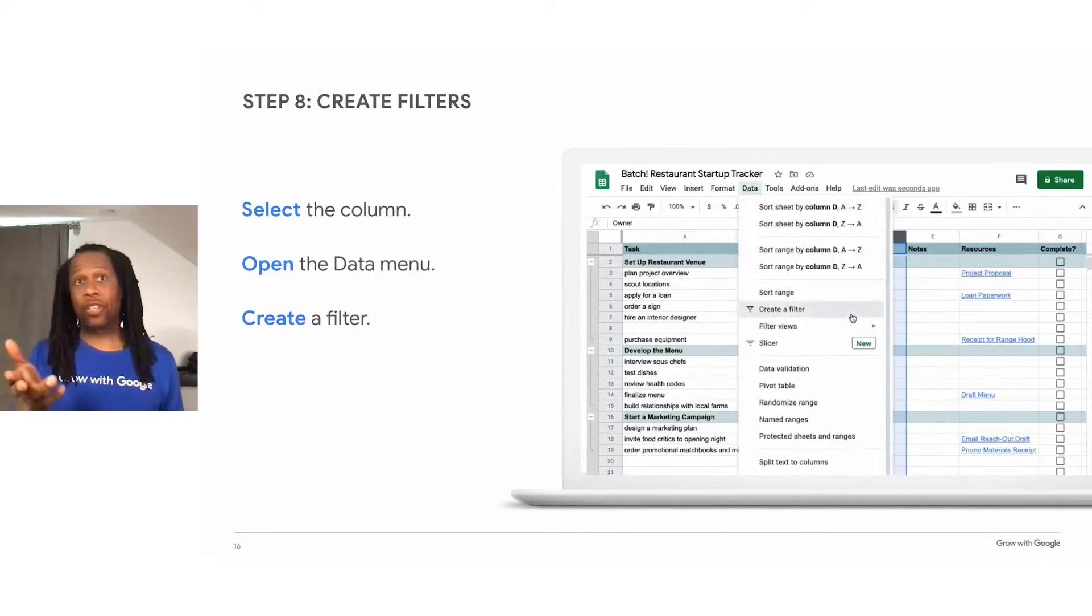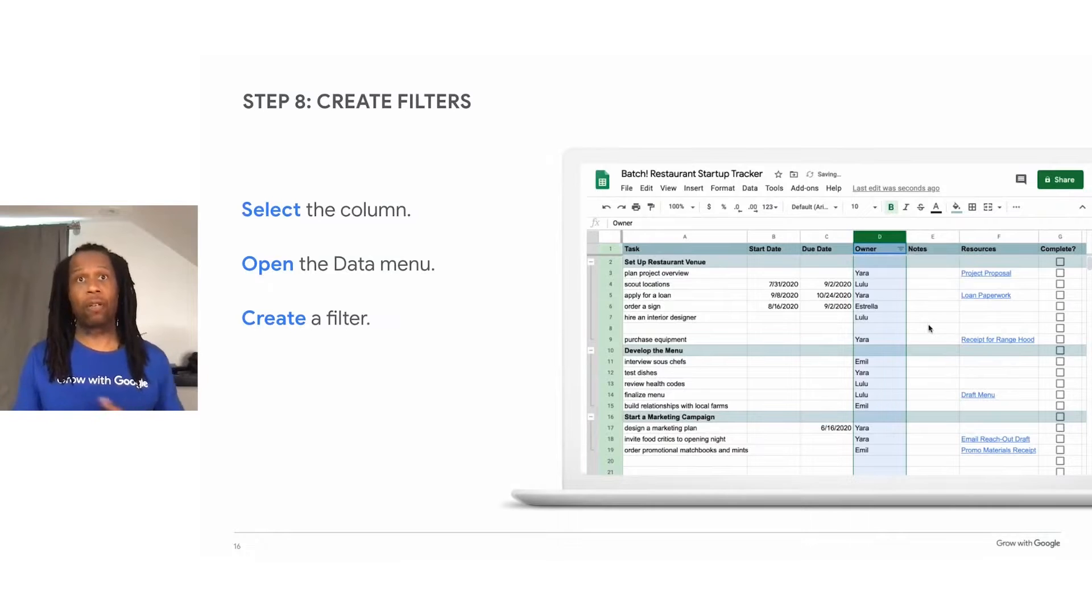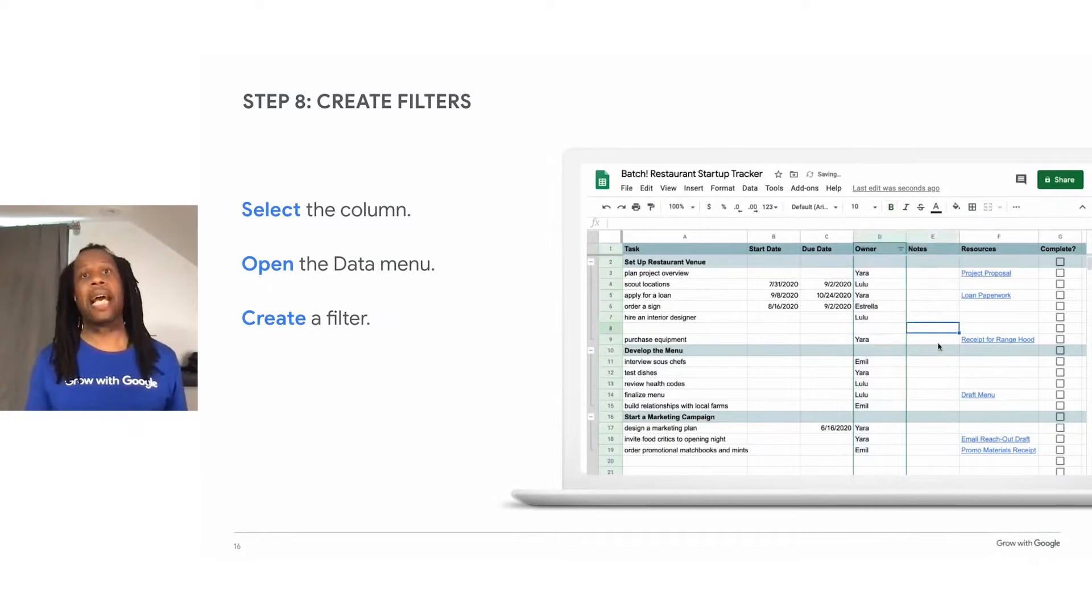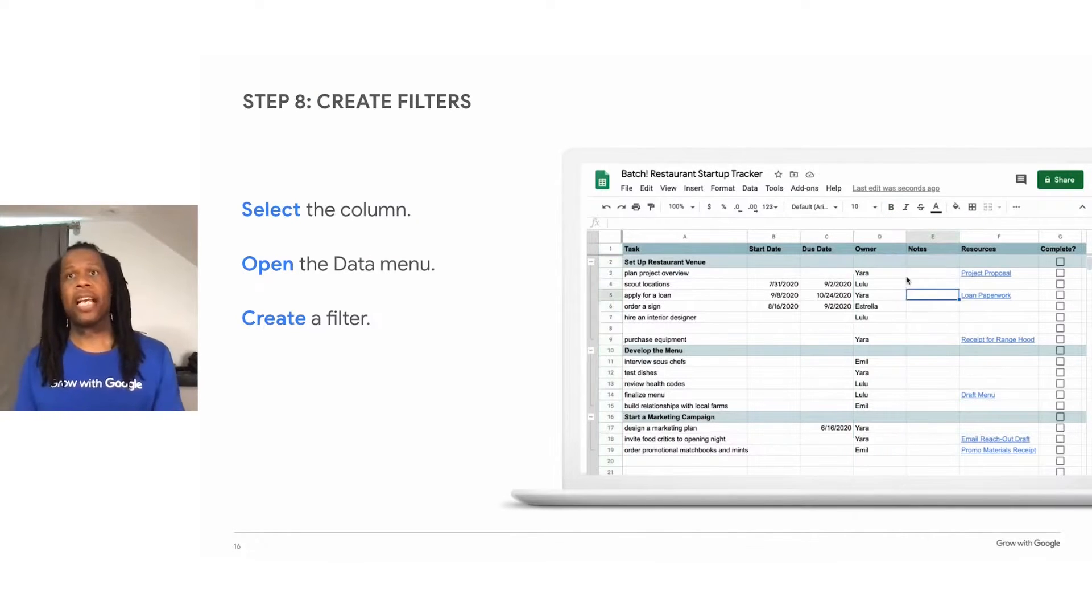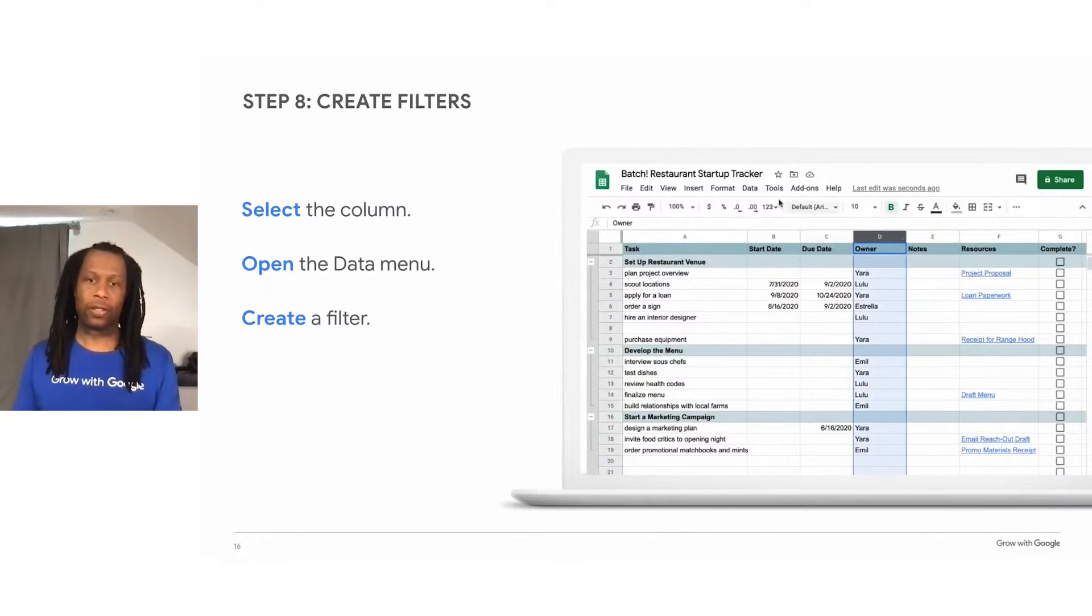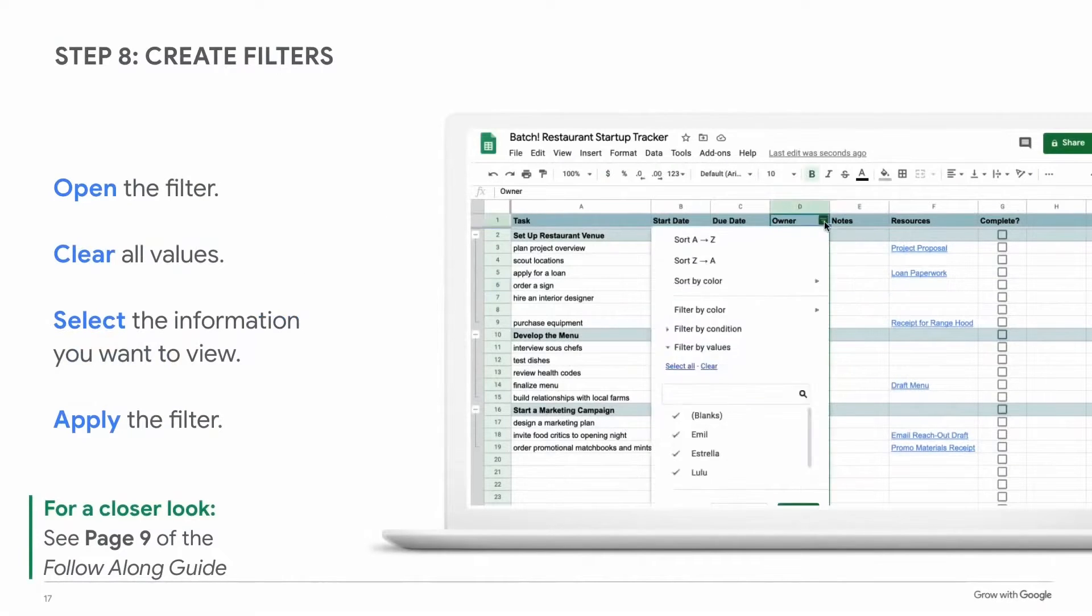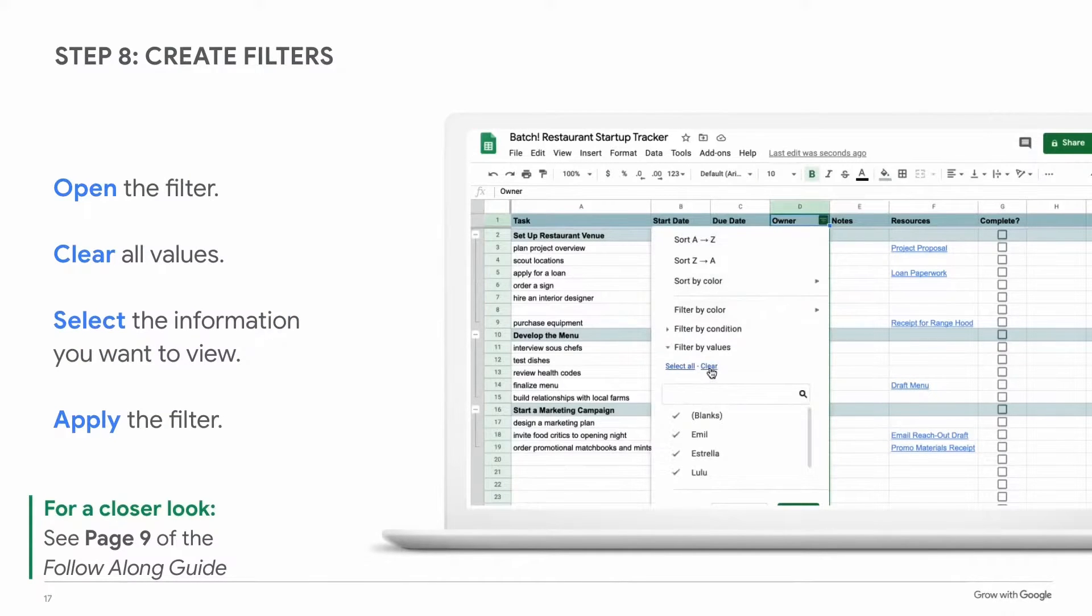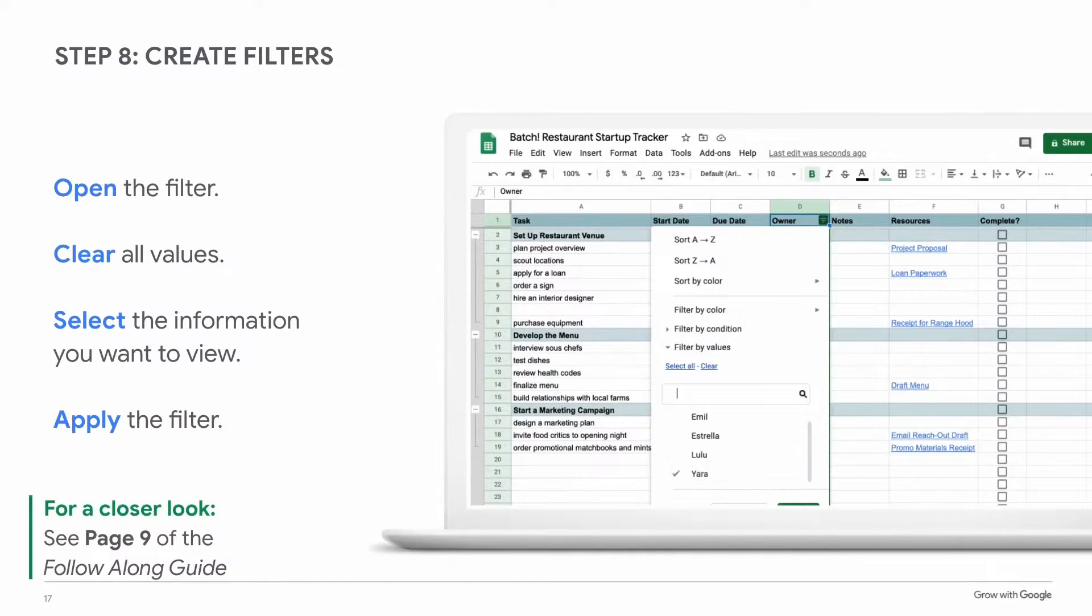The animation on this slide shows a user creating a new filter for task owners. They select the owner column and use the data menu and then create a filter. To use a filter, decide on which information to show. For example, select only your name to see the tasks that belong to you.